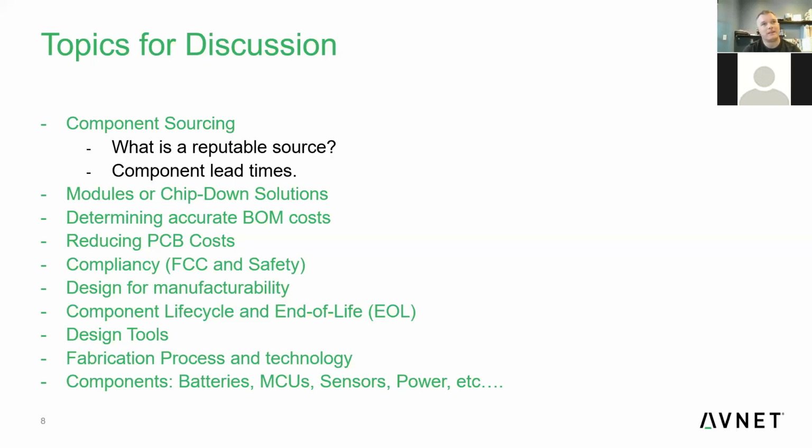But these days they tend to be drying up everywhere, and we're seeing some customers who just can't get capacitors for the next 52 weeks. They're just physically not going to get them. That can have a substantial impact on your schedule and your financial situation. So it's an area where you really need to be careful.